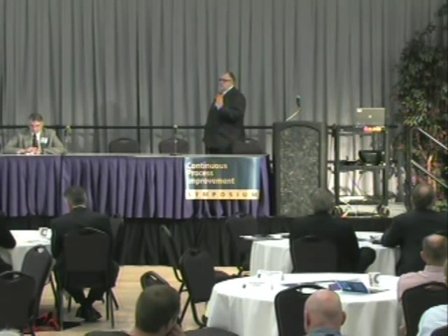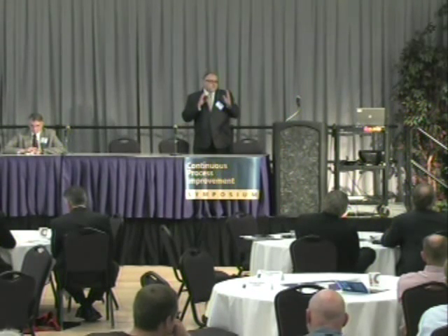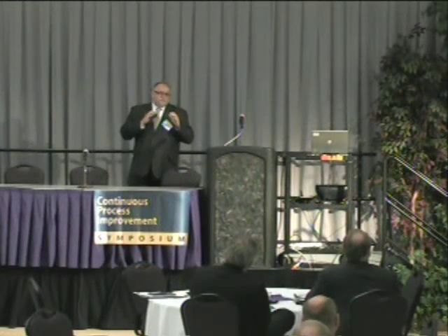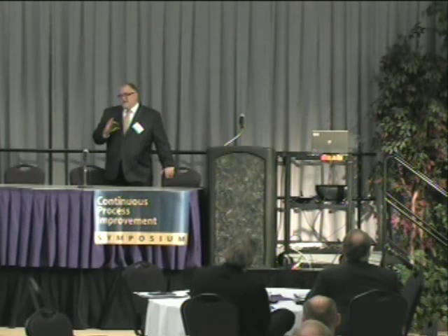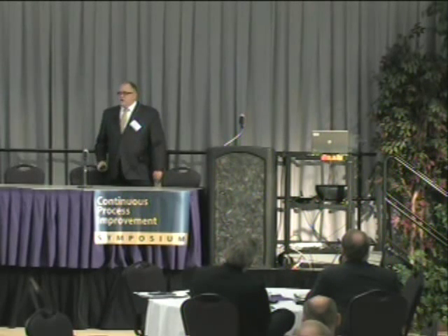Now, just a thought here about the length of the project. Projects should not be any longer than about 60 days, 90 days. 90 days is a long project. Why? Because we're ADD, that's why, all right? We can't do a project that takes 6 months.